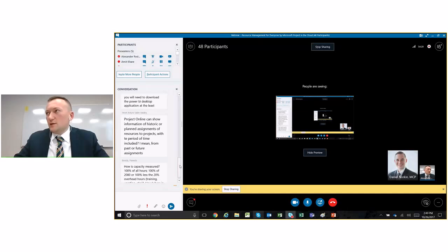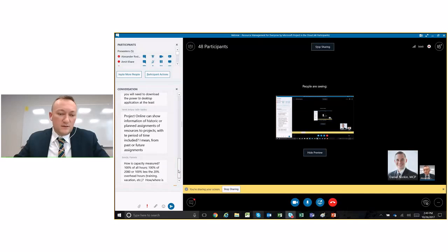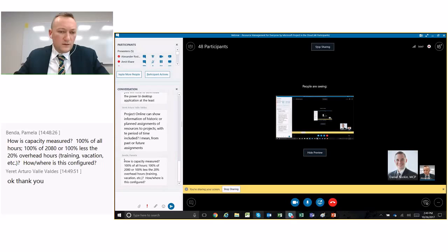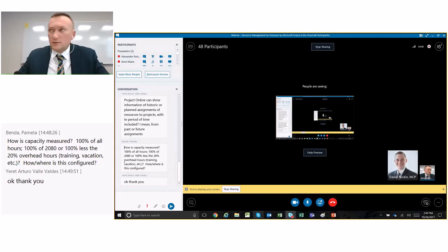So if you change a date for the project from this date to this date, the date will change, but the fact that you did change it is not going to be preserved in the system unless you put another mechanism that stores this data someplace else, in some kind of historical data storage. Out of the box, it doesn't do that, but we'll be happy to work with you on setting some of this trending data capabilities in place.